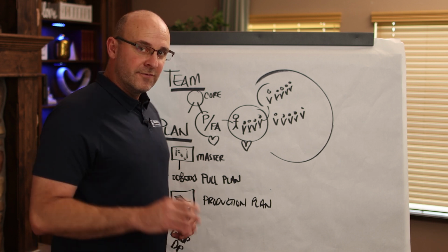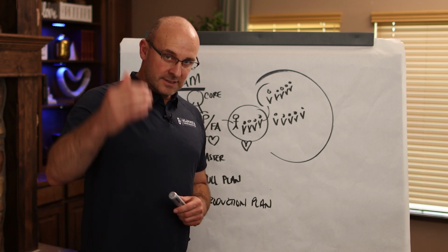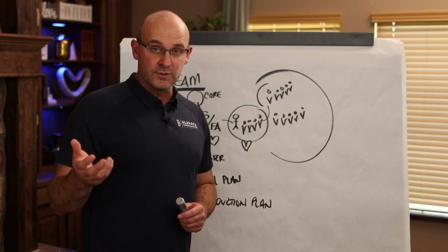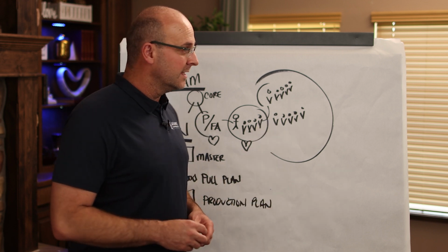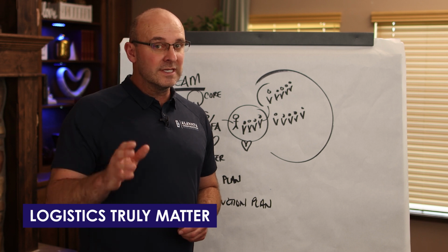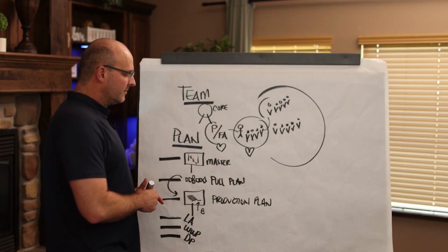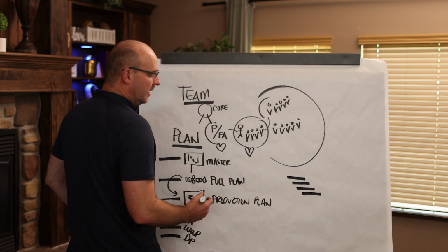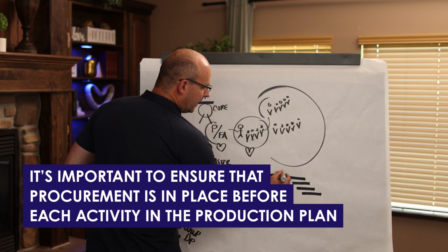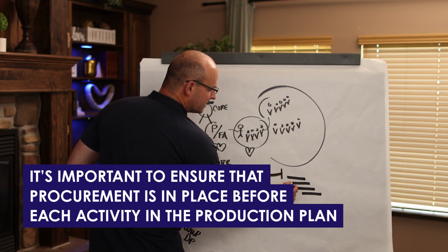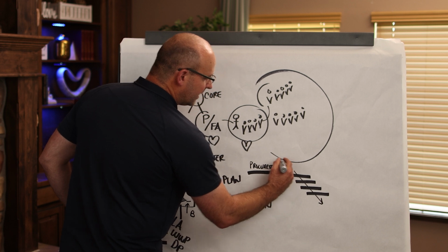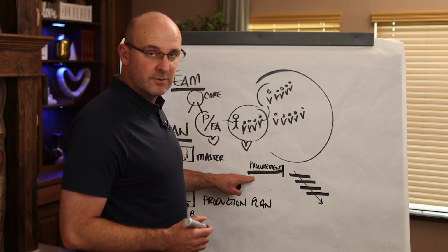Now, another thing from a field operations standpoint, and this is a big lesson that we all know about, but that I learned specifically from World War II movies and biographies and documentaries, is that logistics really, really do matter. So when we have this plan, and I'll just go ahead and draw this in my typical tact format, we must make sure that ahead of each of these activities inside of our overall production plan, that we have our procurement. And what I mean by that is that we have the information, the materials, the equipment, the labor.